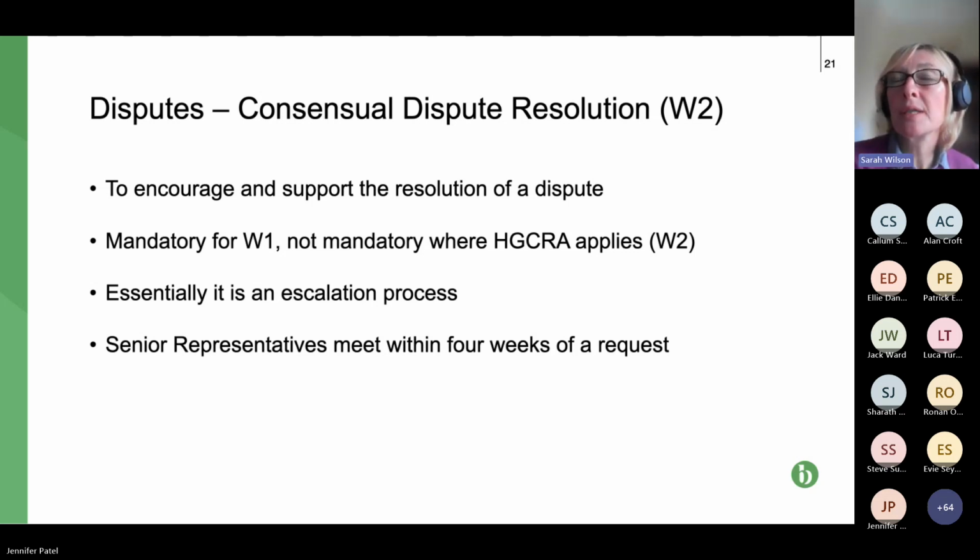W1 is the alternative, and that applies to projects abroad, because our Acts of Parliament, Housing Grants Act included, don't apply abroad, and also to some projects where the Housing Grants Act in this country doesn't apply. So some water sewage treatment works, some food processing works, pharmaceuticals. There are some exceptions to the Housing Grants Act.